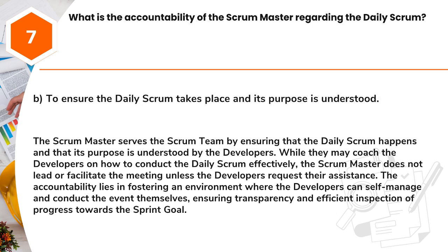Answer: B. To ensure the daily Scrum takes place and its purpose is understood. The Scrum Master serves the Scrum team by ensuring that the daily Scrum happens and that its purpose is understood by the developers. While they may coach the developers on how to conduct the daily Scrum effectively, the Scrum Master does not lead or facilitate the meeting unless the developers request their assistance.